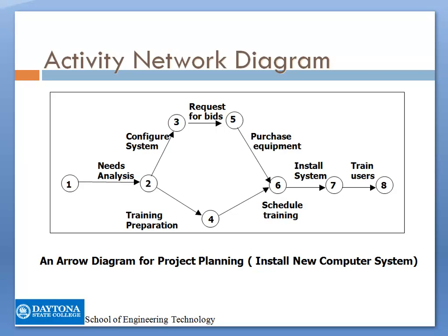Once you place those different arrows, you see that those activities now have numbers, and the arrows follow the path that they should go. Then you can add the time, and the time could be the activity time, the earliest start, the latest start, the earliest finish, and the latest finish. In that way, you can obtain the critical path.